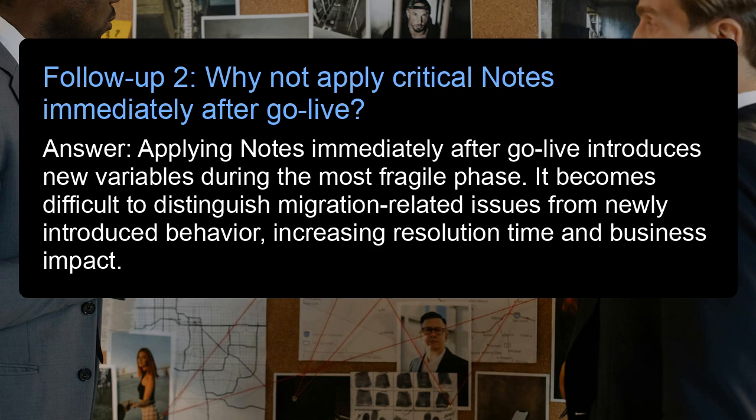Answer: applying notes immediately after go live introduces new variables during the most fragile phase. It becomes difficult to distinguish migration-related issues from newly introduced behavior, increasing resolution time and business impact.